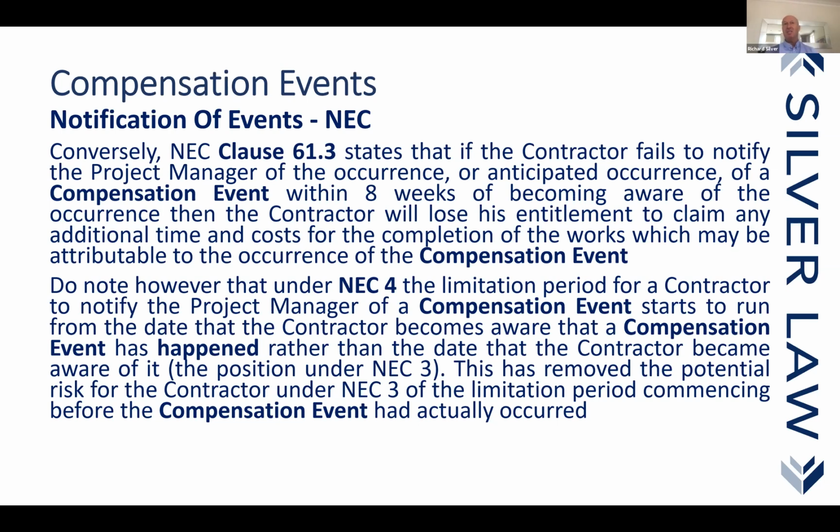of the meeting, which was subsequently issued, that the relevant code of practice that was required to be met was revised and changed. What this meant was that further tests were required to be undertaken, because under, if I remember rightly, the original code of practice, if you found in 10 buildings, and you went into the first one and they all were built roughly the same time, the first ceiling had asbestos, you could assume that the others had it. Whereas under this other code of practice, you could not do that.